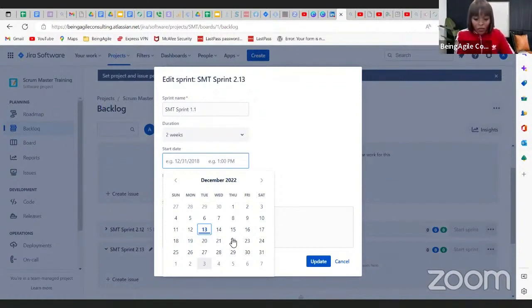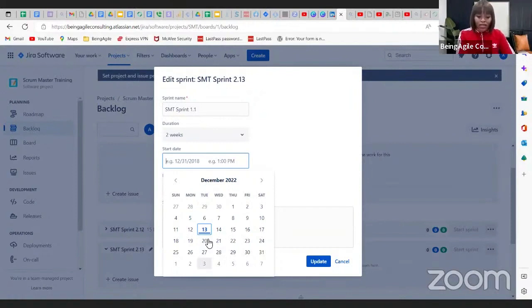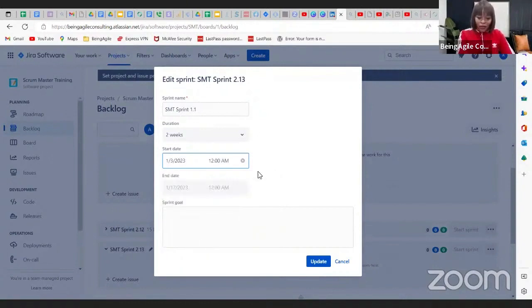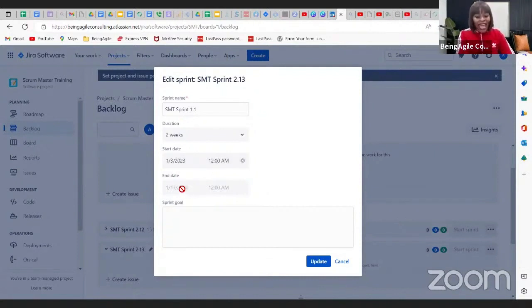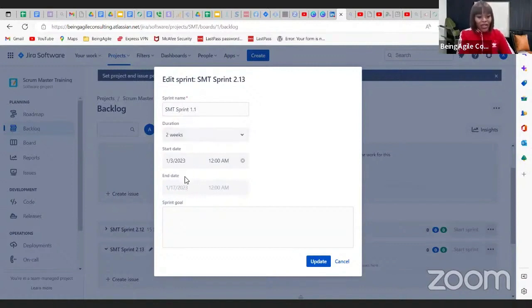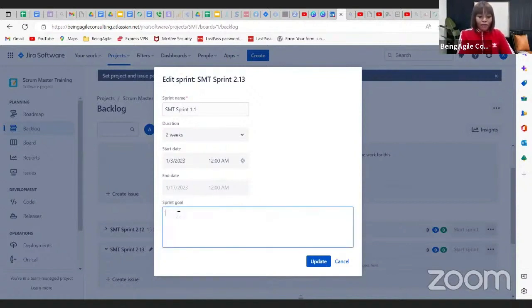Yeah, so now in our own case as well, our new cohort is going to start on the 3rd of January, so that's why I'm going to select this third as the start of the new sprint. And then as I've selected the third, Jira has automatically adjusted the date for me. You see, I don't have to go select the end date of the sprint because I put two weeks here, so Jira now calculated what would two weeks be, what would the date be, and Jira has automatically put the date in there for me. So I don't have to do anything. And then here is where you enter the sprint goal. This field here is where you enter your sprint goal. And once you're done with that, that's all.